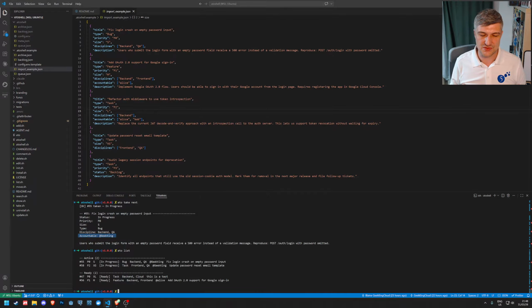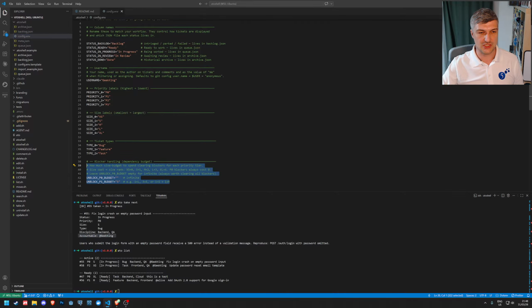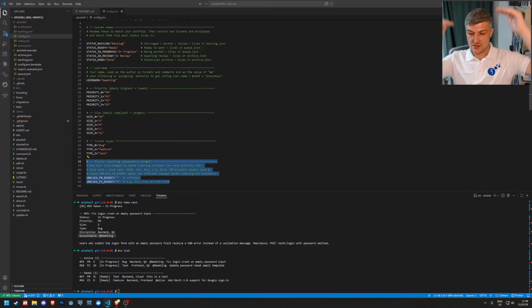However, there is an interesting thing that happens here with the budget that I mentioned, this budget here. So what happens is you have all of these tickets. If you have a P0 ticket, super high priority, but it's blocked by a bunch of other tickets, that kind of bloats the size of that ticket massively, right? So now it's no longer just a small ticket, very high priority. It's all of these tickets and this ticket. And so I wanted to build some kind of system of being able to say, what is the next best ticket for me to take with some kind of timeline budget, right?